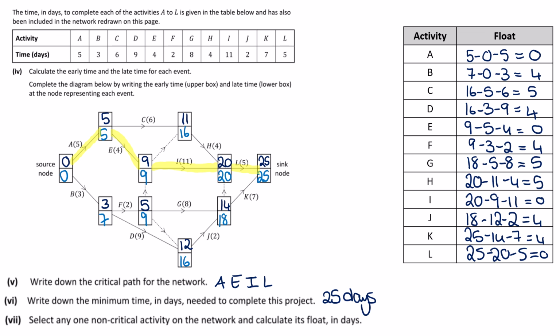Okay, so there are all the floats calculated for all the activities. Make sure you're very, very clear on how to do that and not to accidentally assume that it's just the early time minus late time for the finishing, because that sometimes works, but it won't always.